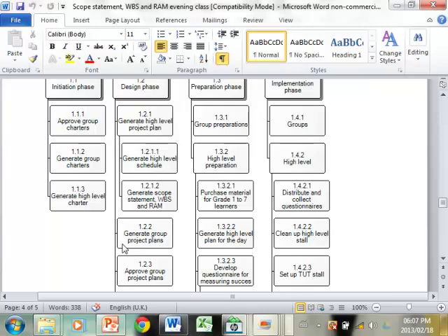Okay, so obviously in your high-level specification you can specify milestones. You can specify, I want a prototype by this date, and you won't have the detail of how they got to the prototype, but by the 30th of June they will deliver the prototype. And you will have written the test specification by the 30th of June.